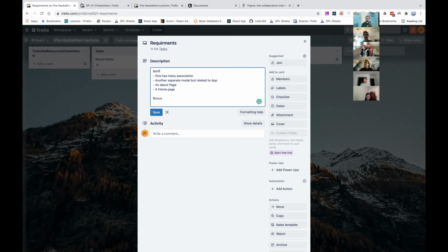You'll say, here's all the things we want to do, and you get this huge list. There's a tendency to over plan what you think you can do. So we can break features up into MVP, minimal viable products. You can think of these as must haves. These are things we have to have.